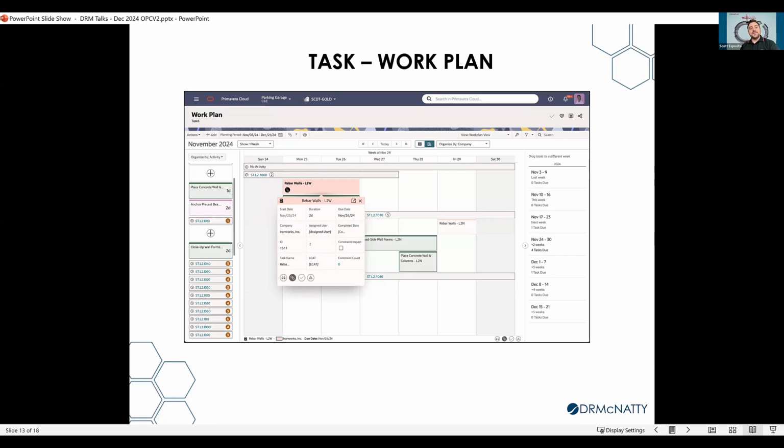Holding people honest when they say I'm going to commit to do something, and if they don't commit, they have to give a reason why they've miscommitted, right? And we roll this all up into an analysis dashboard so we can get the correct scoring for our specialty tier vendors out there, right?